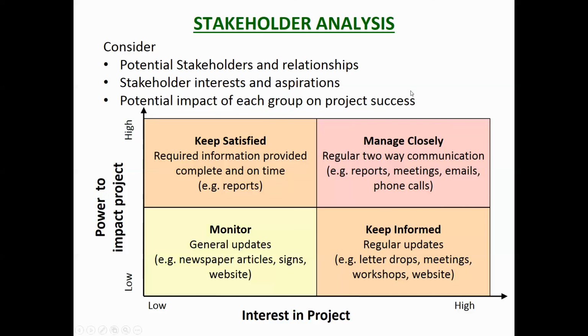And then there's the group that are really interested in the project and have a lot of power over it, and that would be the client and the project team, and that would be regular communication. These are the people that you spend most of your time on. You spend whatever time is required to keep these people satisfied. So these are the two groups that you're really concerned with spending most of your time and effort on for your communications.